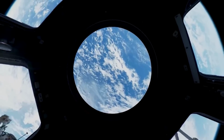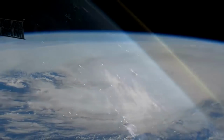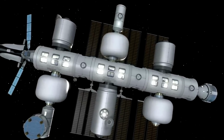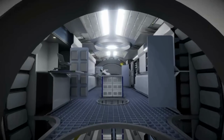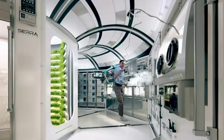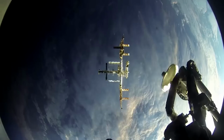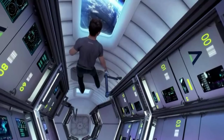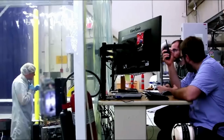By now, in early May, the last significant update regarding the station itself was almost a full year ago in August 2022. Specifically, last year, the Orbital Reef team successfully completed its System Definition Review, or SDR, with NASA. The milestone showed that Orbital Reef's envisioned architecture is sound and cleared the project to proceed further into the design phase. Since then, we haven't heard anything regarding the specific phase progress or its estimated completion date. Until this design phase is complete and approved by NASA, a lot of the physical construction of the station segments and other hardware will need to be held off.